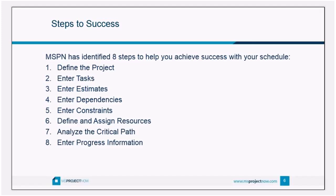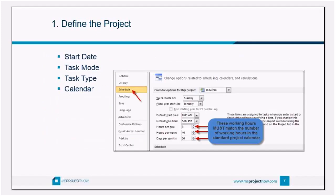In step one, when you define the project, you want to set the project start date. I can't tell you how many times I've seen people create a milestone at the top of their schedule, call it 'start,' set a date on it, and link it to every task. There's a much easier way — go into Project Information and set that start date. You can also set a different calendar there, and we're going to talk about task mode and task type.